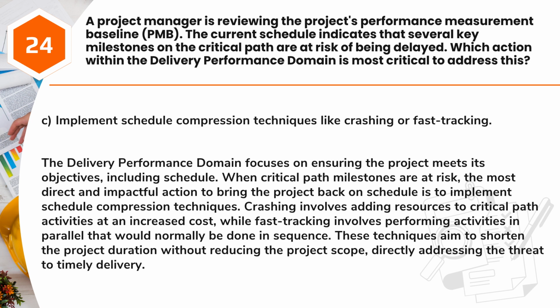Answer: C. Implement schedule compression techniques like crashing or fast tracking. The delivery performance domain focuses on ensuring the project meets its objectives, including schedule. When critical path milestones are at risk, the most direct and impactful action to bring the project back on schedule is to implement schedule compression techniques. Crashing involves adding resources to critical path activities at an increased cost, while fast tracking involves performing activities in parallel that would normally be done in sequence. These techniques aim to shorten the project duration without reducing the project scope, directly addressing the threat to timely delivery.